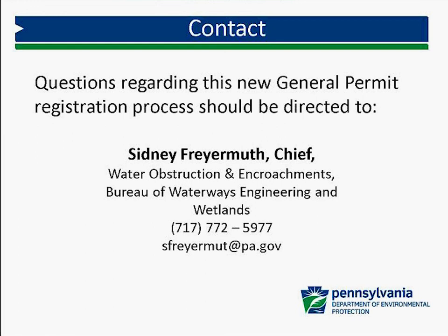Will FEMA maps still be required for submittal with the GP registration? I don't have any GPs in front of me. I'm unsure whether a FEMA map is required for submittal, but there are areas where GPs are not eligible in FEMA map floodways. So if you're in a FEMA map floodway, you should not be registering a GP for that project.